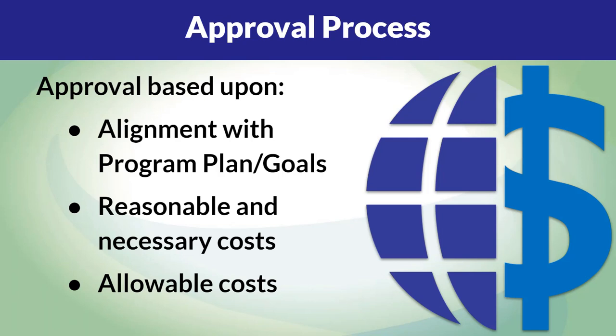Budget change request forms go through several stages of approval. First, your CLC liaison will review the request rationale and compare the proposed changes to your grant application's program plan and goals, looking for alignment. For example, if a proposed change includes an increase in non-capital objects to purchase STEM equipment, but there is no mention of STEM in the site's program plan, you can expect follow-up from a DPI consultant.